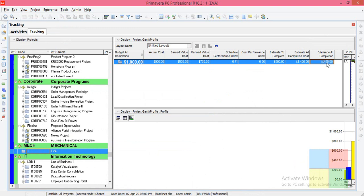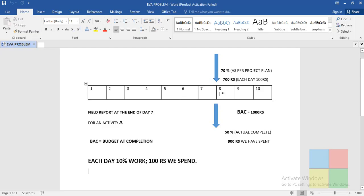Variance at Completion (VAC) is 400. This tells us how much extra money you need to complete the project. We have already spent 900 out of 1000 rupees, so we have 100 rupees balance. But we still need an extra 400 rupees beyond that remaining 100 to complete the project.